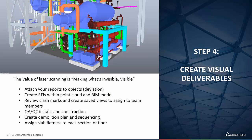For example, in the picture here, these are the items that need to be removed — all the point clouds are shown in red, limited to those points, so we know where they clash with the new design. Attach your reports to the object: for example, for slab flatness, you attach the report, the heat map, and the cell file to that object. So every time you go to, say, the third floor and want information about the concrete pour, you can easily load your point cloud and the heat map associated with that slab, with all data in one place.